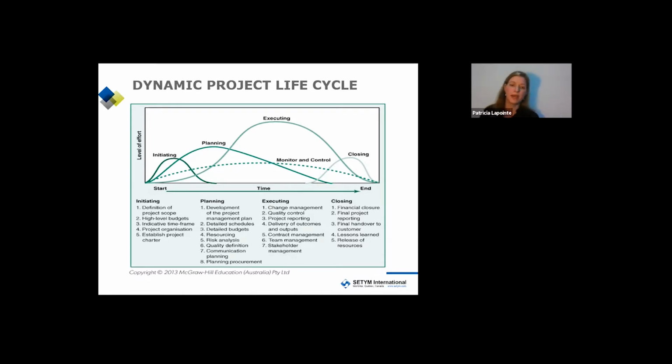So according to PMI, there's 5 phases to the project lifecycle. The World Bank would see 6 because there's negotiation between the country that's getting the loan or not, but each phase has a different purpose. So usually at the initiation stage, we try to understand the context, we're trying to understand the problem, and the outcome of the initiation is to really have selected a project and define the basics. You want to define your project charter, which is the basis of your project, just high level, how much you think it would be, who it is for, and so on.